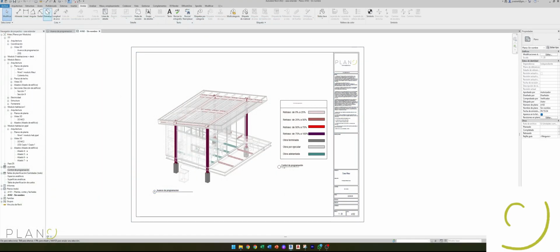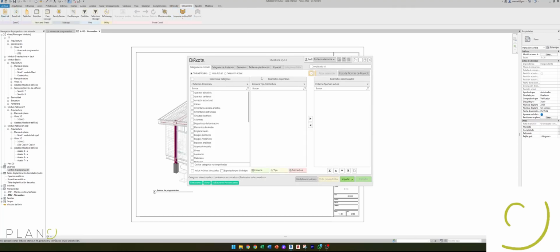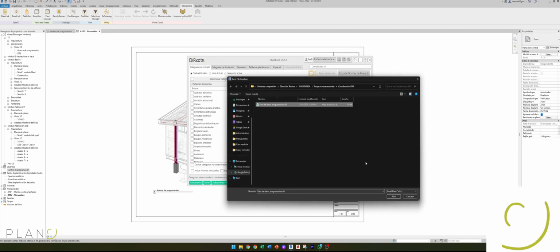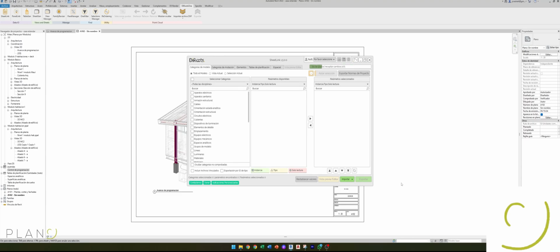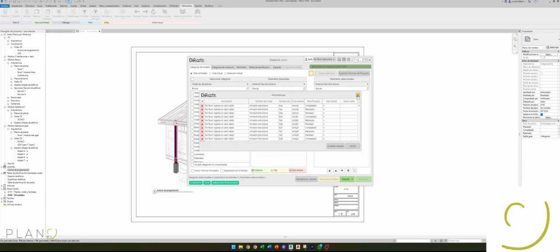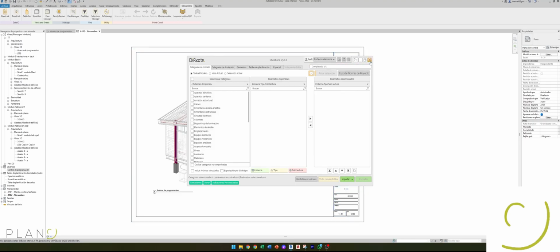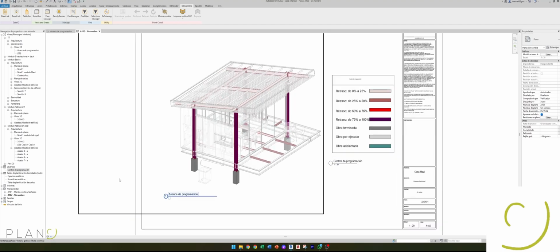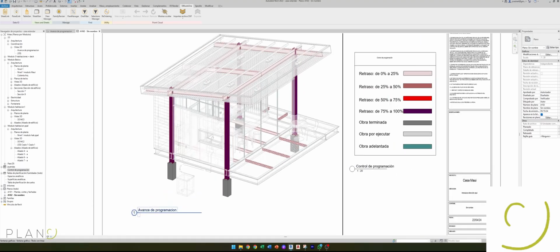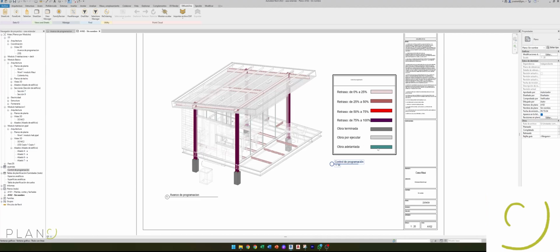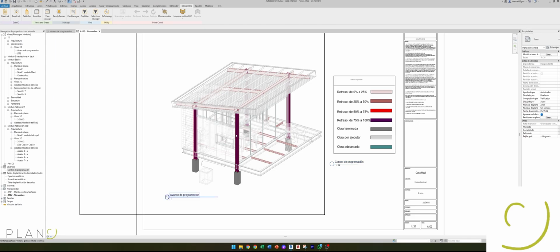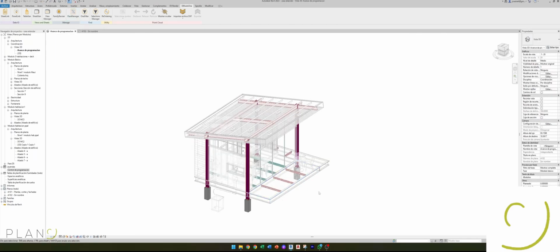We go to the Roots plugin, which is very simple and easy to execute. We open it anywhere and click on import data. Then we click open. It goes through its process and tells us which data is not synchronized. We click accept and look, it changed already. Here we can see that what was green, indicating progress, no longer exists. The most delay, between 75% and 100%, just as an example, is in this color.